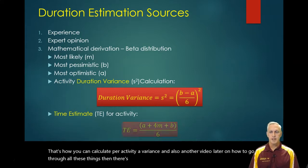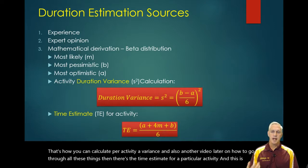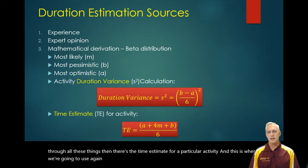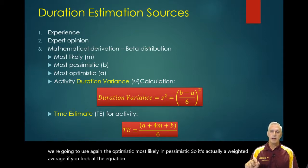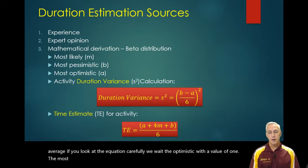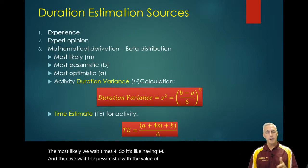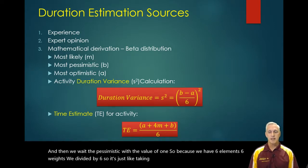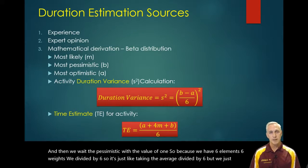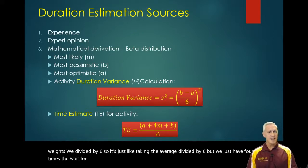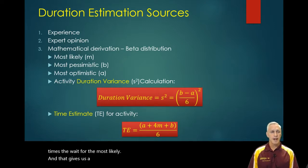Then there's the time estimate for a particular activity, and this is where we use the optimistic, most likely, and pessimistic again. It's actually a weighted average. We weight the optimistic with a value of one, the most likely we weight times four — it's like having M plus M plus M plus M — and then we weight the pessimistic with a value of one. Because we have six total weights, we divide by six. We just have four times the weight for the most likely, and that gives us a time estimate for each and every activity.